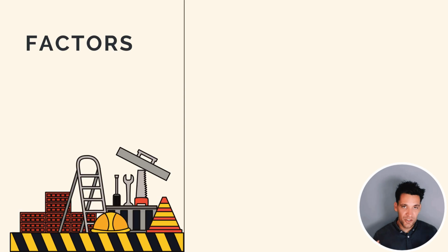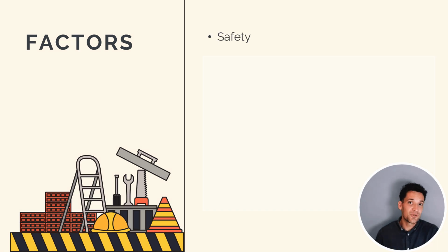So how do we make the decision on the best model to choose for any package of works? Well, it comes down to several different factors, and we need to consider all of these to make the best for project decision. Number one is safety. Do we have the skills and expertise to manage it ourselves, or do we need to engage a specialist contractor? The cost, is it going to be a lot cheaper to self-perform than it is to subcontract? Is it worth the additional risk and management needed?